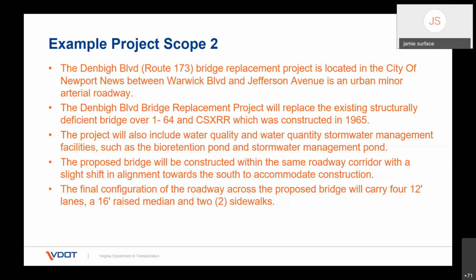They also need to look at how the drainage is going to work and how we're going to direct drainage. We cannot direct drainage toward the railroad or any additional drainage toward the railroad in these configurations. So you've got to remember that. So this kind of gives them the big picture, and it also gives them some of the unique characteristics of the project. Next.